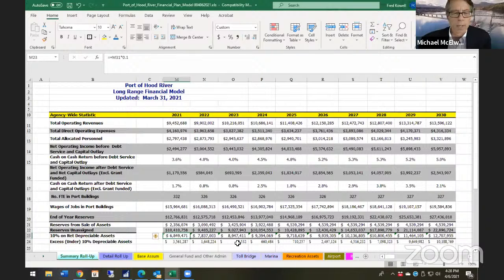Yeah, I just reiterate that the reason you go through the EIS is to identify impacts and identify mitigation. So the presumption is that if there is an impact to the port facilities, the bridge project would mitigate for that. If it requires moving, reconfiguring a portion of our yard or shop, or even relocating, that would be incorporated into the bridge project.